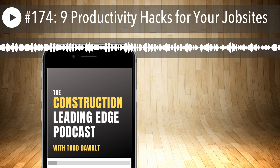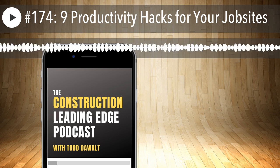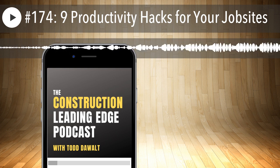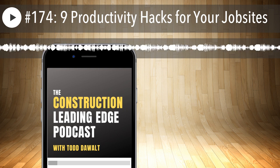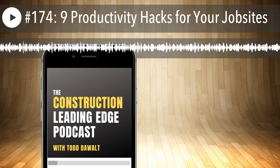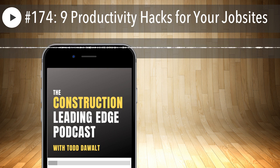So number one, my number one productivity tip: stay out of stores. Period. Stay out of stores. Shopping is incredibly expensive. Shopping during revenue-producing hours is incredibly expensive. So keep your people out of Lowe's, Home Depot, supply houses. Keep them out of gas stations. Keep them out of anywhere that they're spending time picking up materials. Just stay out of stores. And if you'll do that, then your productivity will.